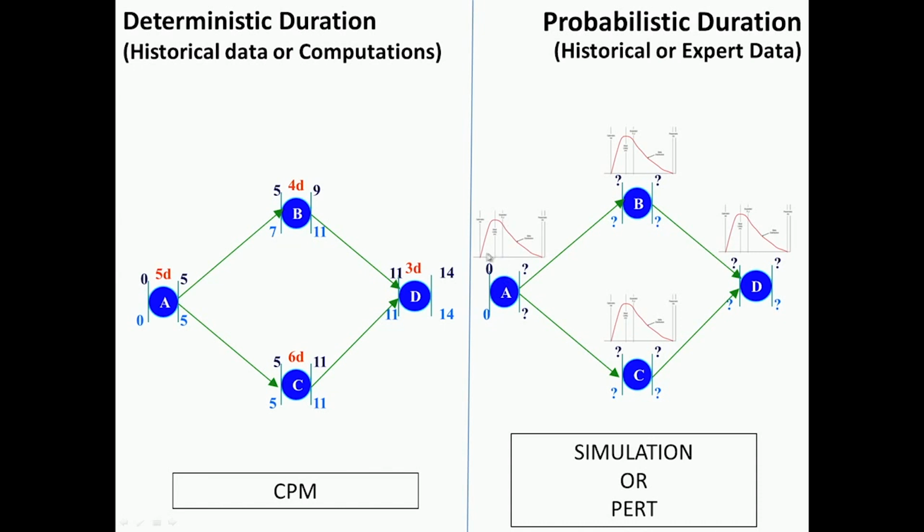So there is no particular, specific value. A can take a range of values based on the distribution it specifies, and sampling the distribution at each instance might give a different value for the duration of A, which is what actually happens in reality. Every time I repeat A, it will not take exactly the same time of 5 days, but it will change based on some conditions. If I am able to capture the distribution characteristic and represent the distribution correctly, I have actually captured the uncertainty of the duration of A and represented it appropriately.